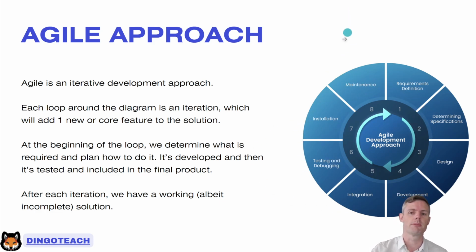And there's 2 arrows in the middle to sort of represent that there is sometimes multiple loops going at the exact same time. So there's multiple teams working on it. So what this is, it's an iterative approach. The idea that you start with the first most important feature of your application, you develop that first, and then you move on to the second feature and you develop that second, and then third, and then fourth. And you're actually doing this entire loop every single feature. So that's what I mean by iterative.